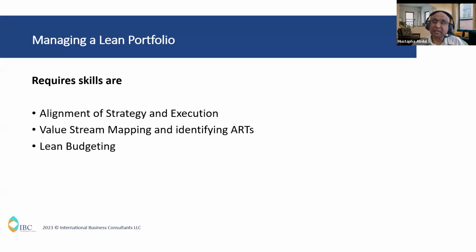People were working day and night. I was working Saturday and Sunday to get this thing off the ground. Had we used Agile, had we used SAFE, we would not have found ourselves in that situation. We would have said, okay, we're going to develop a minimum viable product. We will fund the minimum viable product. Go ahead and do it. And then we decide whether the customer likes this MVP and move forward. If not, as Kevin had said previously, we had to pivot. We had to pivot and go do something else. So that is all about the reasoning for lean budgeting.